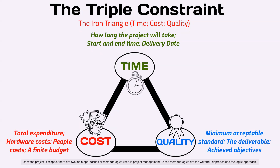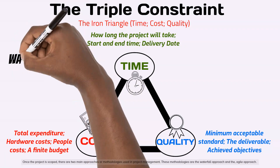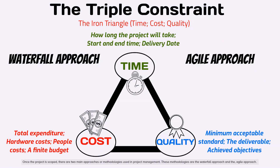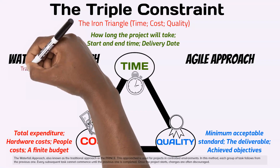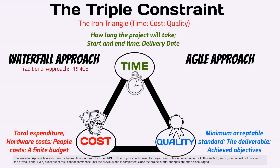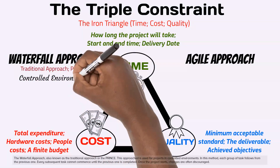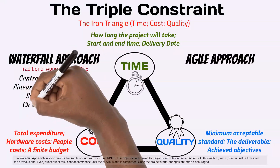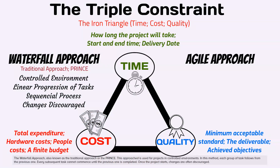Once the project is scoped, there are two main approaches or methodologies used in project management. These methodologies are the waterfall approach and the agile approach. The waterfall approach, also known as the traditional approach or PRINCE, is used for projects in controlled environments. In this method, each group of tasks follows from the previous one. Every subsequent task cannot commence until the previous one is completed. Once the project starts, changes are often discouraged.